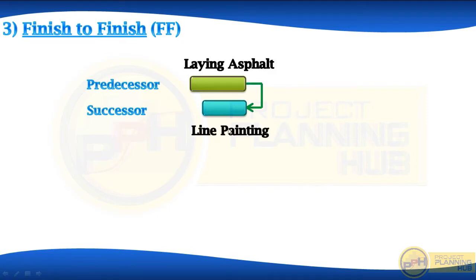Laying asphalt and line painting. We need to finish asphalt laying for finishing line painting works. Until then, this painting work will go in parallel with asphalt works.